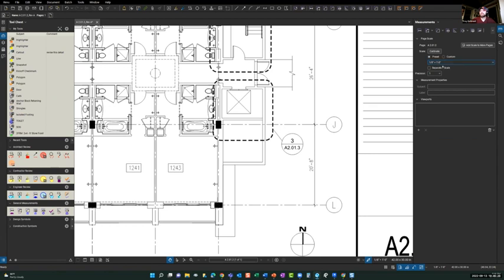The other one is going to fit to the paper, whether it's to scale or not. I know that sounds like a tongue twister and doesn't make any sense, but basically one can be right, one can be wrong, and they won't look any different to the naked eye. So if it's a scan, chances are it's not accurate. If it's printed half size, guess what? All of your quantities are going to be doubled. So I teach all my students to use the calibrate button.